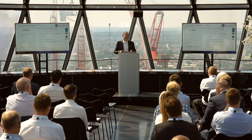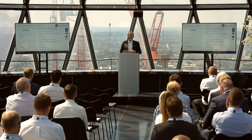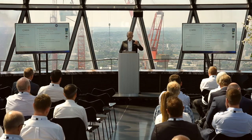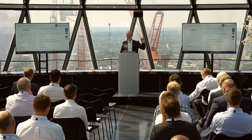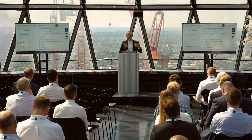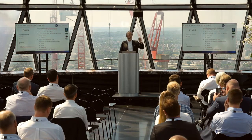So just to give you an example of the power of a commissionability review, I did a job in Canada and opened all the drawings, and every VAV box had a multi-leaf VCD damper shown on the drawing, on the inlet to the box. So if you know about VAVs, you do not need that. And it was just a silly copy and paste error. So it literally took 20 minutes for the designer to open it all, get rid of them, right? That saves $50,000 on that job.